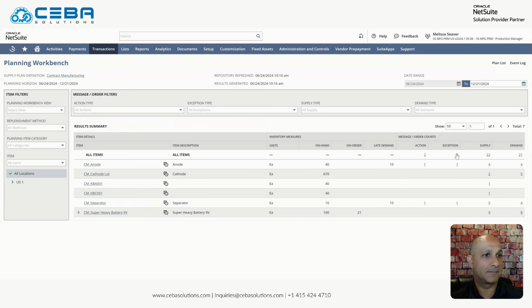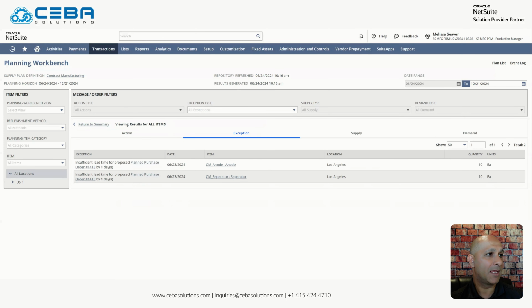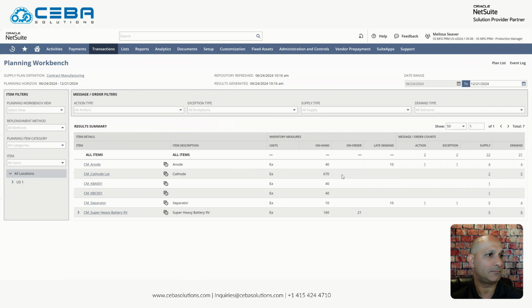Now, if I look at some exceptions over here, these are telling me, well, you've got these planned purchase orders over here, but we have insufficient lead time by 1 day. So let's go ahead and not only release these, but let's get on the phone with the contract manufacturer or the vendor and say, can we place an expedited flag on these particular orders to see if we can get this done any sooner. Now, the lead times are associated with the particular items or SKUs themselves. You can manually enter a lead time, or you can have NetSuite actually calculate the lead time over a period of time as well.